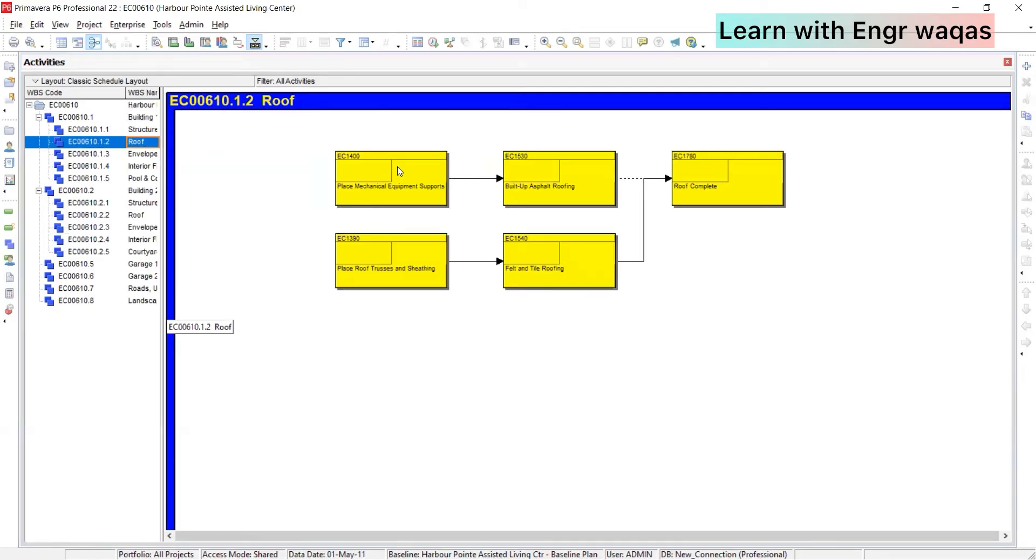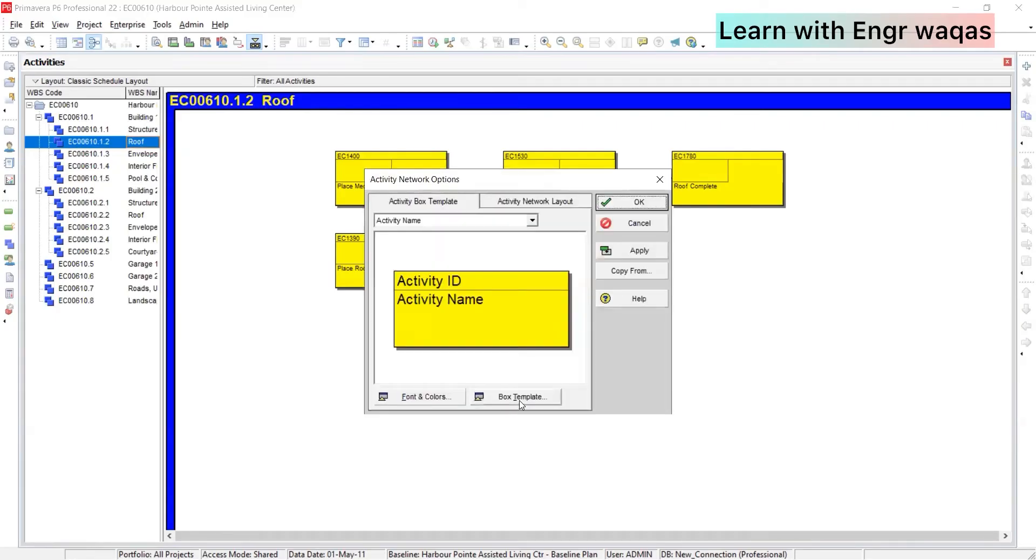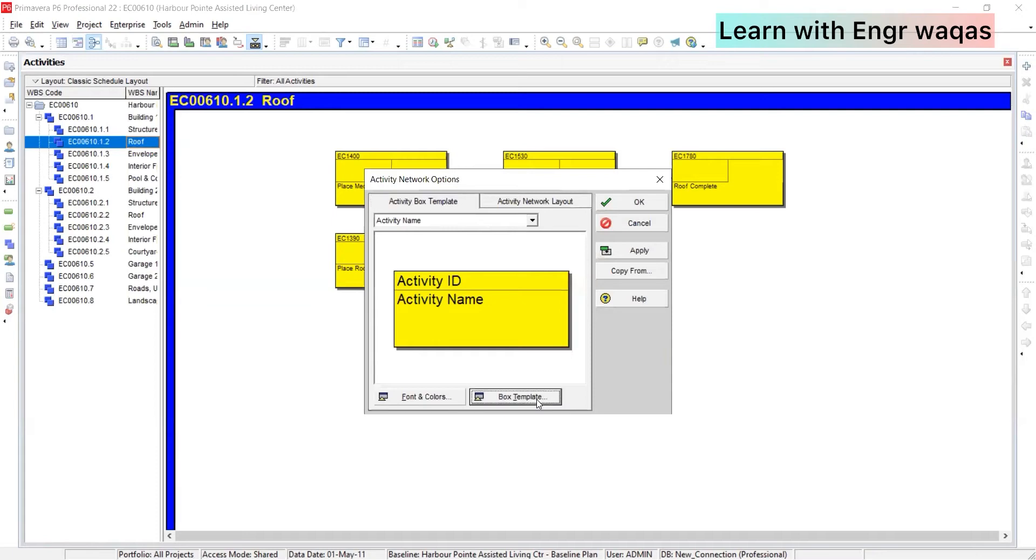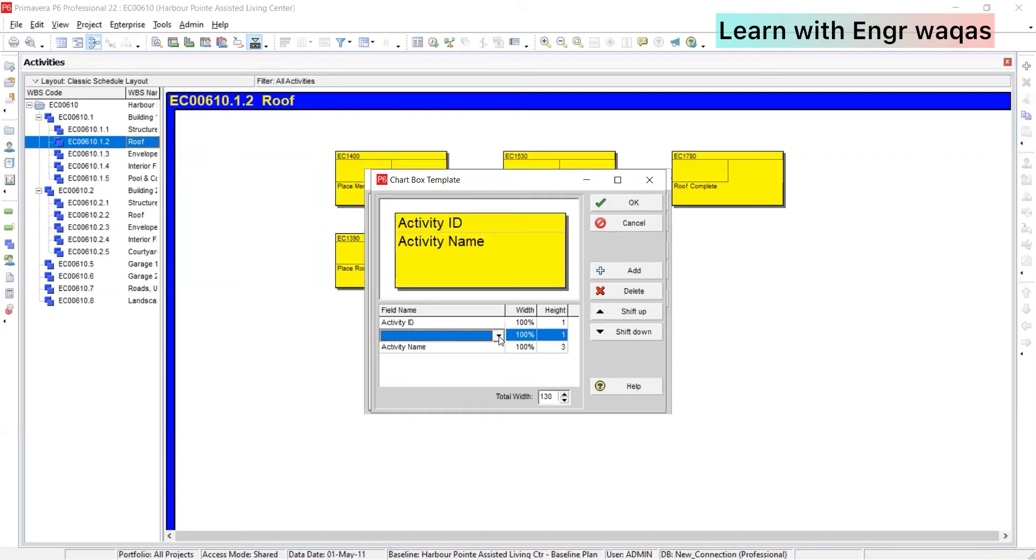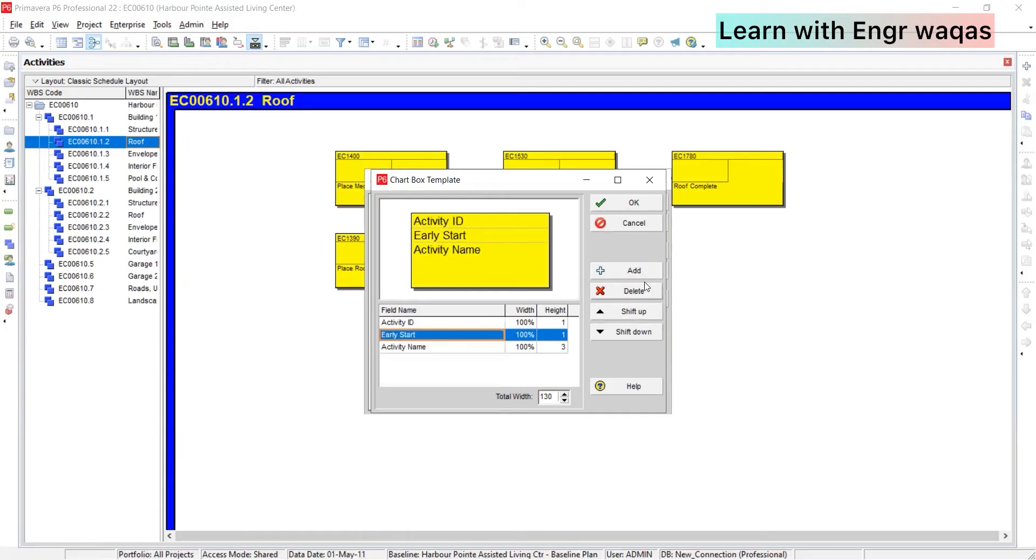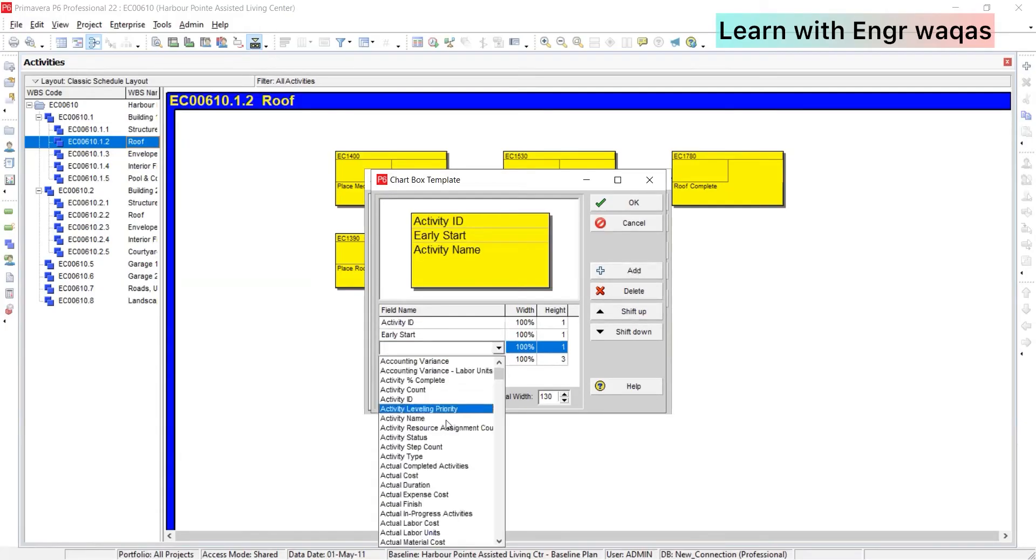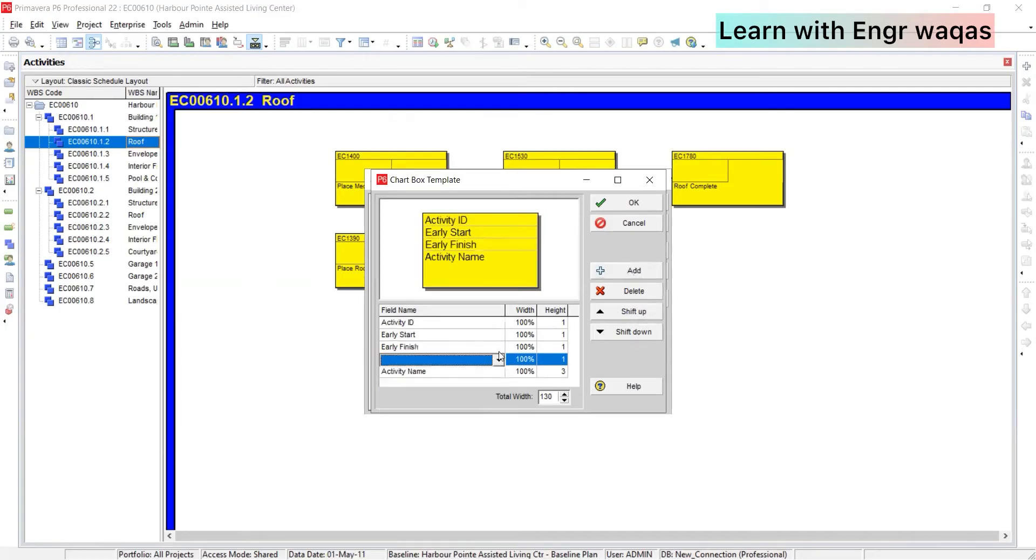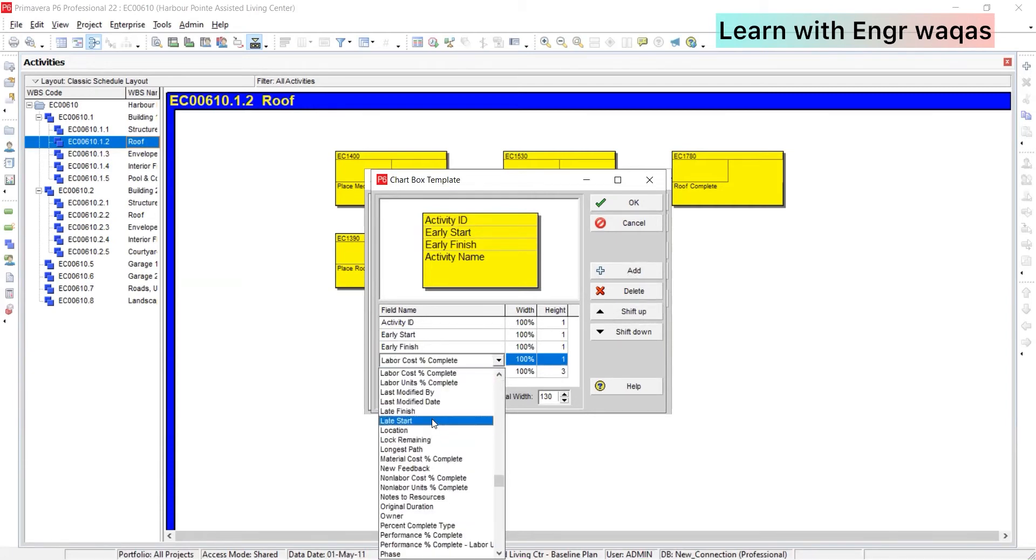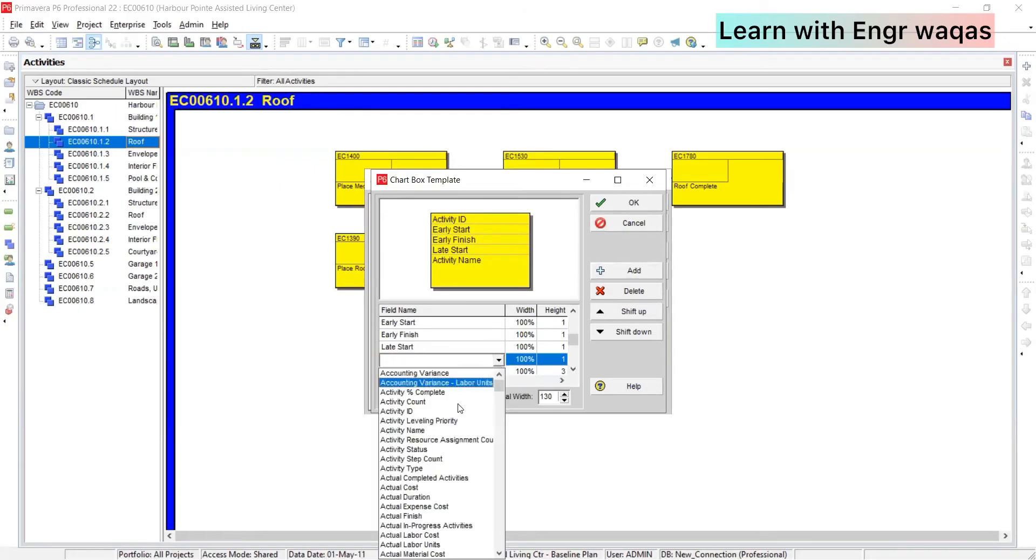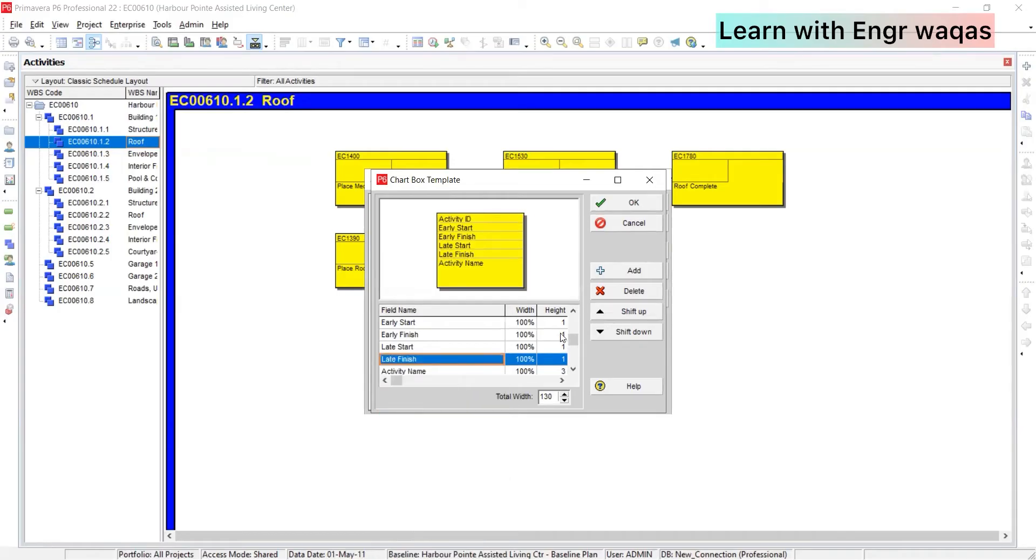Like this way I can change this information as well. It's very important - just right click and I will be given here activity network options. And here I will have box template. I can change many things - activity network layout, I can make different colors, activity box template. And see, there I can add many more things like early start, early finish, late start, late finish, duration, float to make our manual calculated CPM. You got my point? I will make you understand like this way - you can see I will add early start, and I will go like this way, then again add early finish. So my this certain work package will show me everything which I need to understand - late start, and there is late start, late finish.